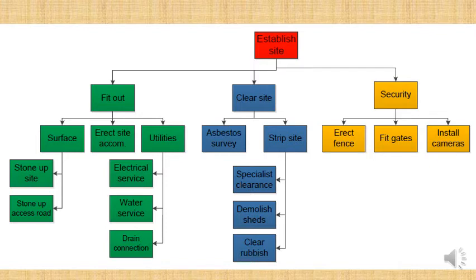And every day they were driving these workers in buses from the nearest town, Bahraini, to the motorway site. And it took about half an hour of driving. And before long, they realized, you know what, we're wasting a lot of time. What we should be doing is building a small accommodation facility so that all of these workers can live close to the work so they can do more work every day.